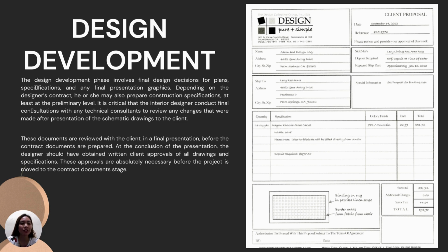It is critical that the interior designer conduct final consultations with any technical consultants to review any changes that were made after presentation of the schematic drawings to the client. These documents are reviewed with the client in a final presentation, before the contract documents are prepared. At the conclusion of the presentation, the designer should have obtained written client approval of all drawings and specifications. These approvals are absolutely necessary before the project is moved to the contract documents phase.